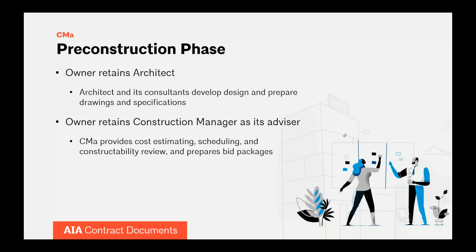The pre-construction phase starts with the owner selecting both the construction manager and architect. The CMA is often selected first and can provide input to the owner for the selection of the architect and contractors. Architect services are pretty much traditional design, construction documents, and contract administration, but with additional interaction and coordination with the construction manager. Under CMA, a lot of the burden of coordinating information, pay applications, and so forth falls to the CMA because of the multiple contractors, which significantly reduces the architect's coordinating work.